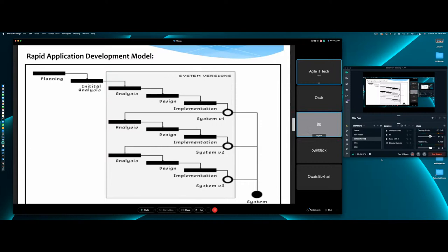No, man. You want to assign a BA to each team so they are totally independent. There is no dependency. You understand? If there were three BAs, BA number one will be gathering the requirements for what? Engine and transmission. That is his scope, his deliverable. Agreed? Yes. BA number two will gather the requirements for suspension and chassis. And BA three is left with the interior and exterior.